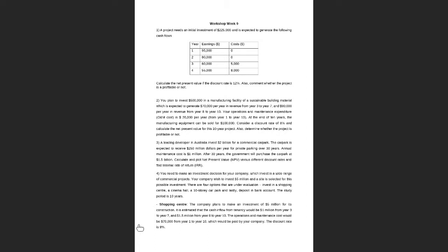Discounted cash flow includes salvage. Yes, of course, you will have to. So the salvage value is given after 10 years. You will have to discount that to the present value as well. I hope that's how you got the net present value, right? 212930.